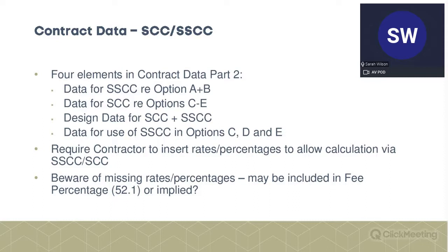All construction contracts have what I call the fill it in bit. So in JCT, we have the contract particulars. So the bits that get filled in are, what's the retention, what's the start date, what's the completion date, is there a performance bond required, is there a collateral warranty required? So all that information that's project specific.